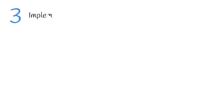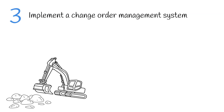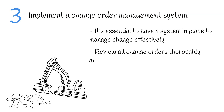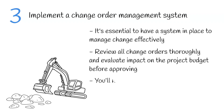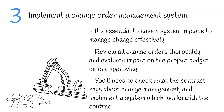The third tip is to implement a change order management system. Change orders can significantly impact the project budget and it's essential to have a system in place to manage them effectively. Make sure to review all change orders thoroughly and evaluate their impact on the project budget before approving them. You'll need to check what the contract says about change management and implement a system which works with the contract that your project is working on.